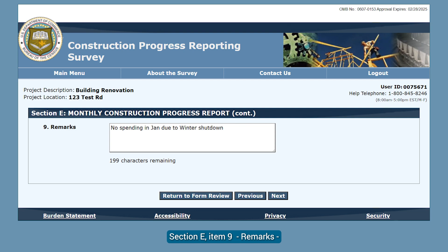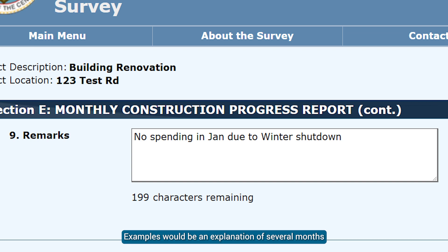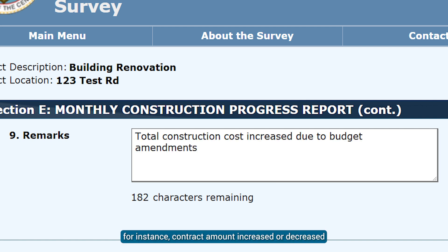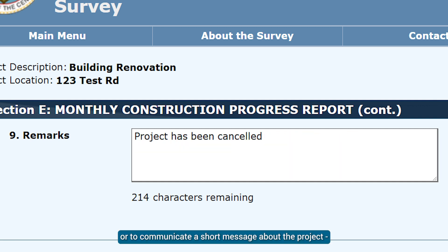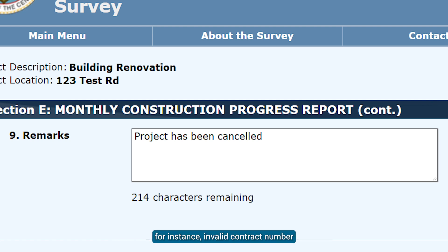Click Next to move to the next page. Section E, Item 9, Remarks, gives you an area to add any relevant comments. Examples would be an explanation of several months of no spending for a winter shutdown or worker's strike, reasons why a value may have changed — for instance, contract amount increased or decreased, or monthly spending amount was adjusted — or to communicate a short message about the project, for instance, invalid contract number, or the project has been canceled.